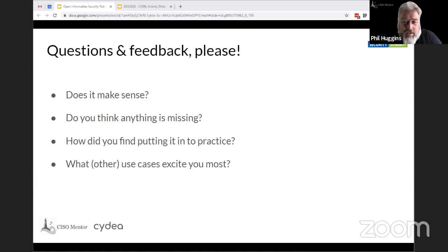And then when somebody comes six months later to look at the register, assuming they were going to make a decision on that basis, they don't have any of the assumptions or data points available that you had when you called it a high medium. So all they can do is take it at face value. They can't rejudge what that means in their current world. I think risk registers are a terrible idea for that. Unless we're capturing the data and the assumptions behind the risks when we analyze them, what's the point of keeping a list? But anyway, that's my normal customary rant.